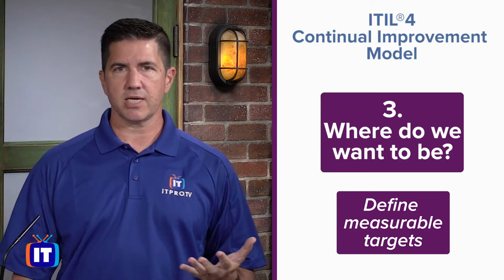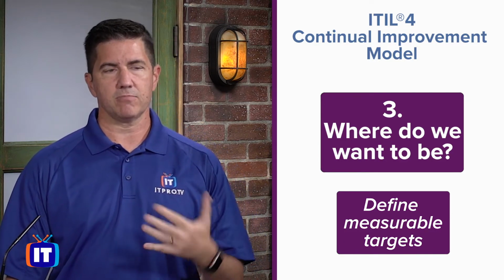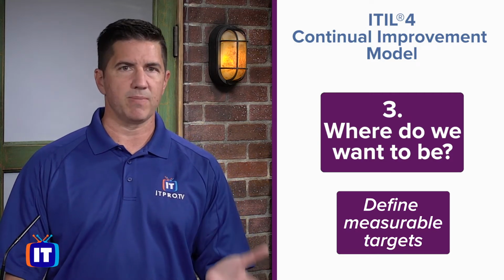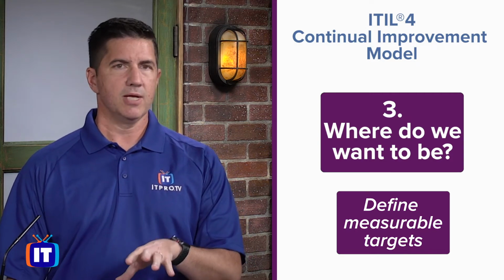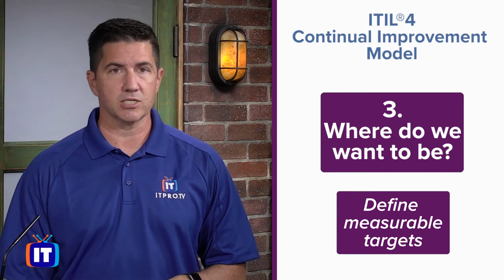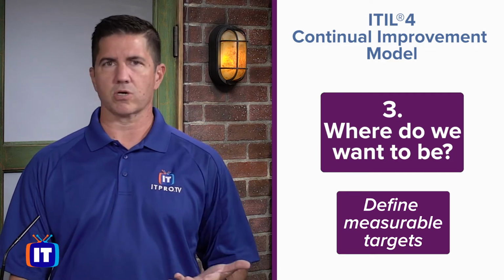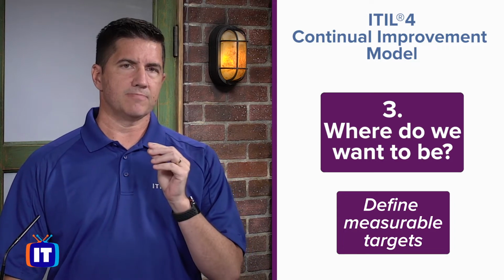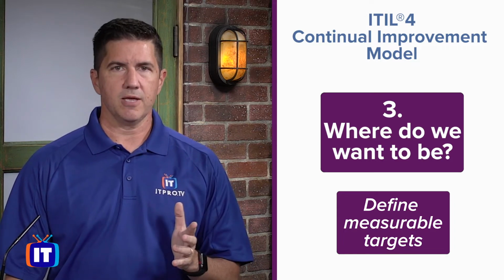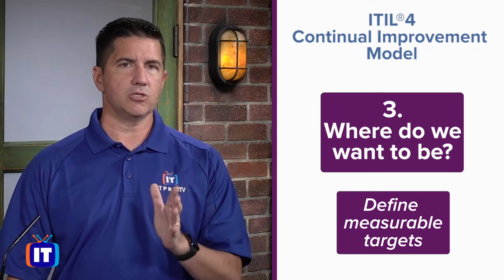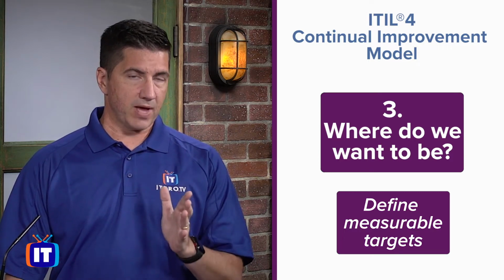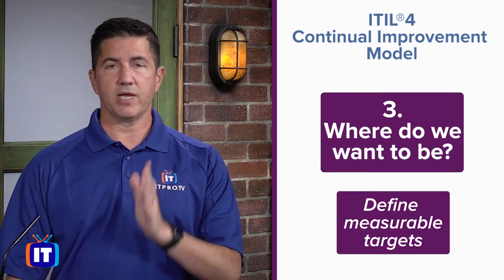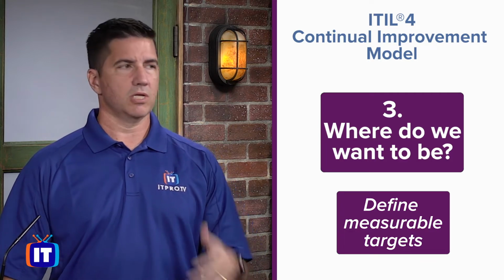So she needs to set a target. And she decides that, well, doing a little gap analysis, maybe some benchmarking against other service desks in the widget industry, and she knows kind of what their scores are. She says, I am going to set a goal or a target of having a 72% FCR score over the next 90 days. So let's talk about that.